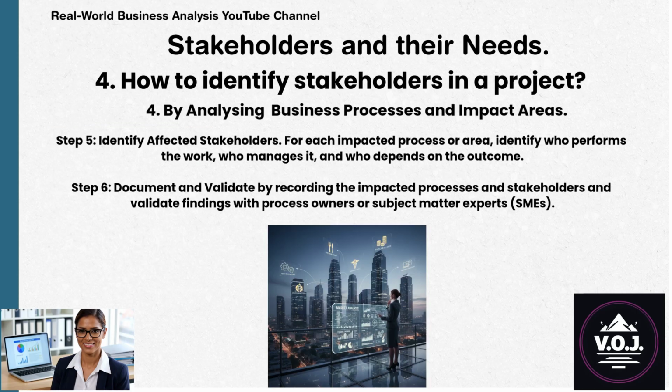Step 5. Identify affected stakeholders. For each impacted process or area, identify who performs the work, who manages it, and who depends on the outcome. Step 6. Document and validate by recording the impacted processes and stakeholders and validate findings with process owners or subject matter experts, SMEs.